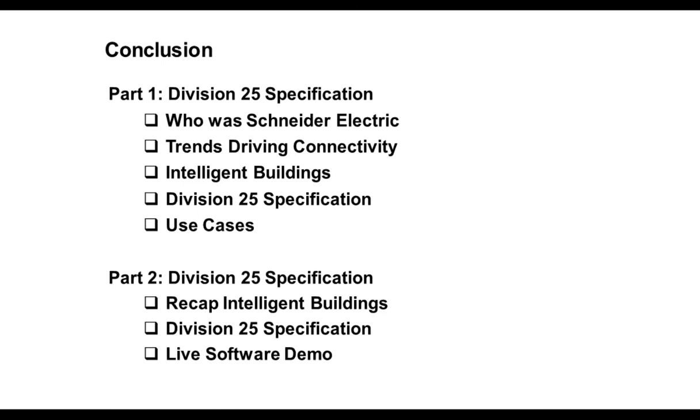Now, not every project allows for that, so it really gets back to the contracting models that are available today. Sometimes those are available, sometimes they aren't. We've seen where Division 23 controls would be put completely in Division 25, and we've seen where we've tried to put 25 in Division 23 under a mechanical contractor and have it coordinated that way.